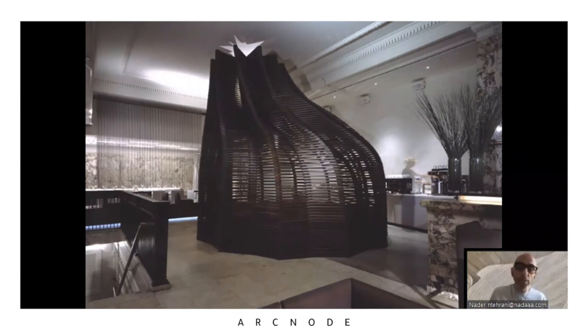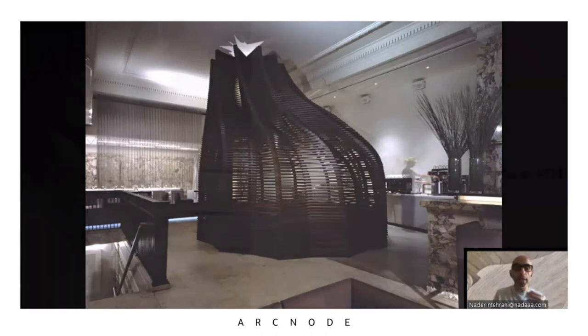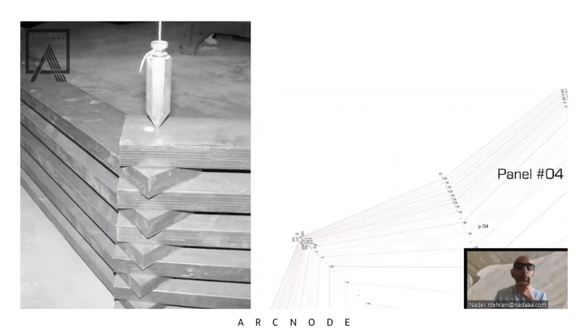a project of about 6,000 square feet for which there was about $205,000 worth of construction. The problem was when we did the drawings for this vessel, this hookah den, we got from the contractor a budget of something around $170,000 just to build that. And we didn't understand why. And that left us only $30,000 to renovate the entire rest of the structure.